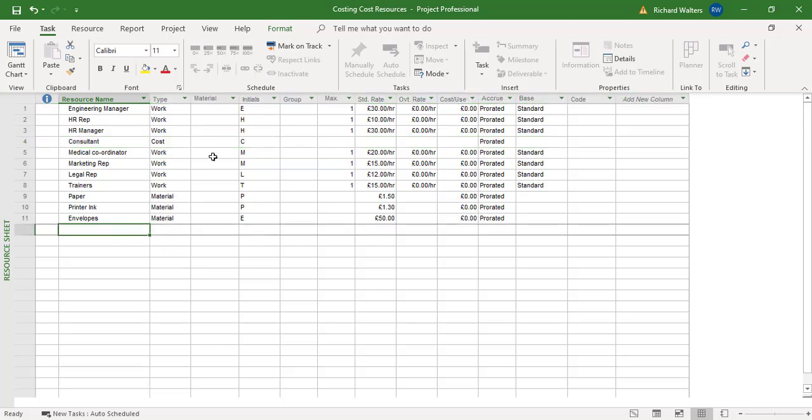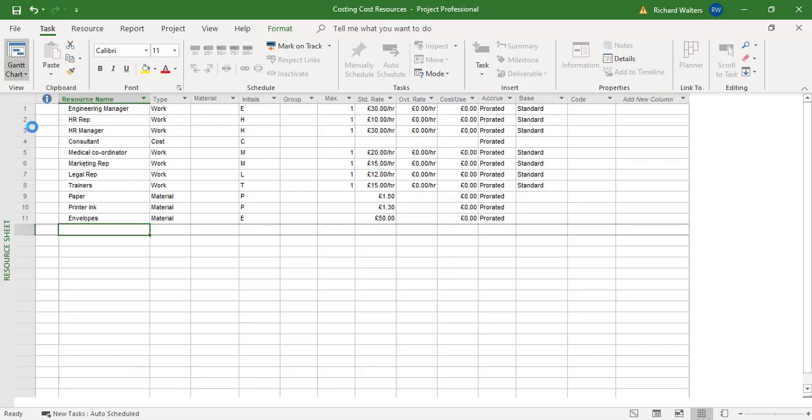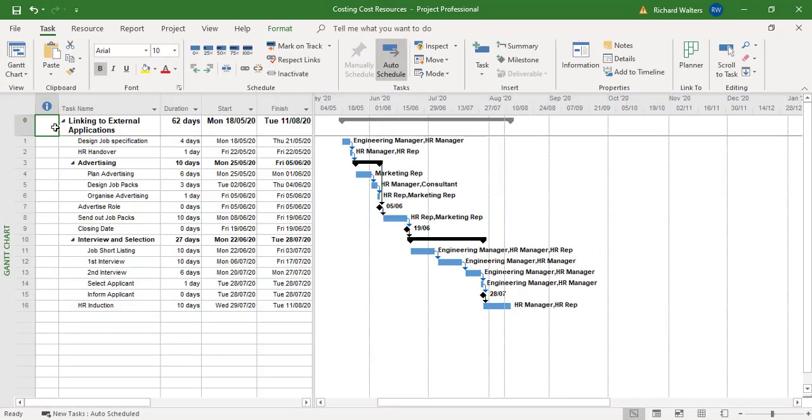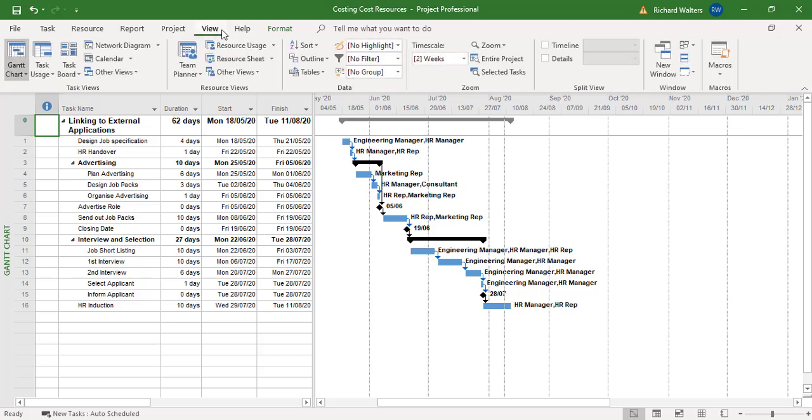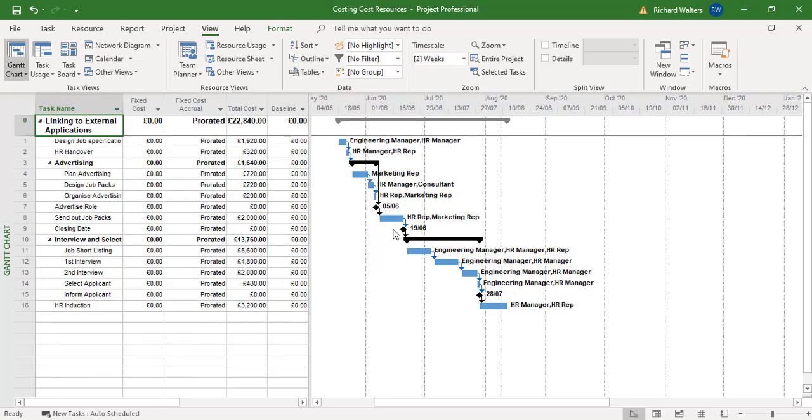And I'm just going to go to the cost table first, so I'm going to go back to the Gantt chart. I'm just going to review the cost table. So right now we can see under advertising, there's a £1,640 cost for the total of advertising. And at the moment, design job packs has a £720 cost, which is against the HR manager at present.